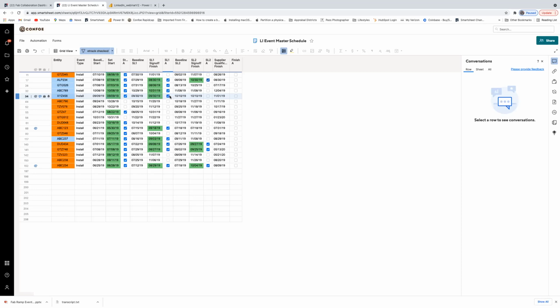And you'll find that an awful lot of them get done before power on. Why is that useful? Well, the way we're structuring our work says you've got to wait till the power's on, but our people are smart enough to know, well, you can do these other things without power, might as well do them. Well, why don't we go ahead and acknowledge that and make it part of how we fast track tools? So there's a lot you can learn from the data at any level.